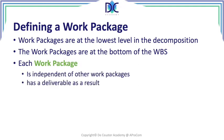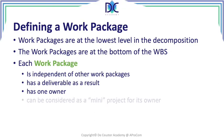Every work package has a deliverable as a result. There is one owner — very important, one owner — which can be a company or one person. It can be considered as a mini project for its owner.